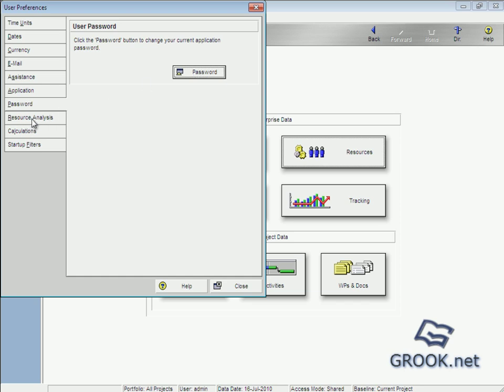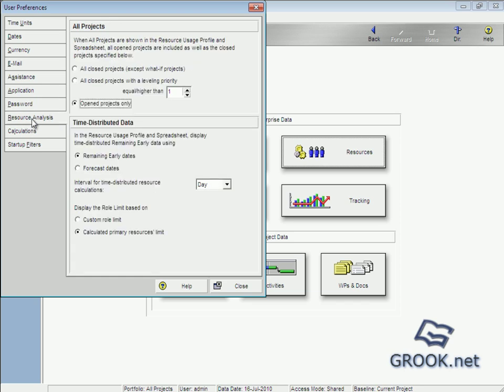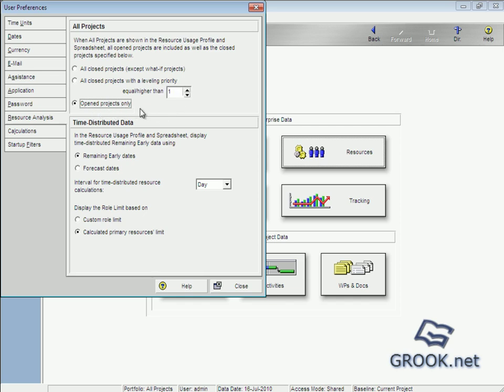Resource analysis, resources, and here to specify projects that included a remaining value calculations. So we can choose all closed projects, or all closed projects with a leveling priority one or two, or open the projects only.